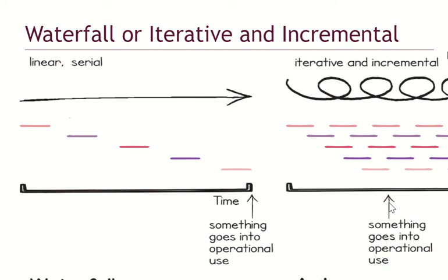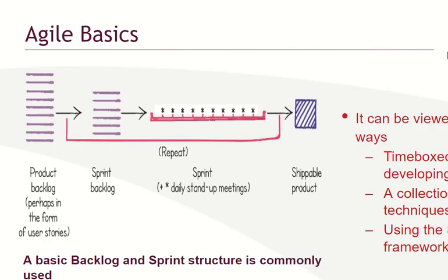Do we understand? In agile approach, the person can live there after 3 or 6 months. Why? Because in agile approach, you will do the ground floor in a way that it can be inhabited, and then you do the first floor, it can be inhabited, and then the last floor. So that is agile. I suppose we understand that explanation and the example I gave. Okay?